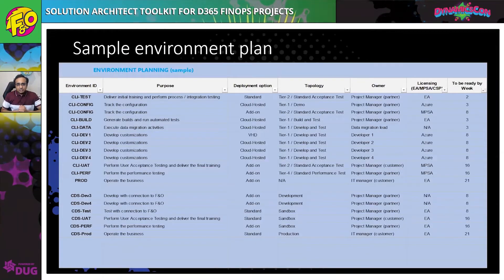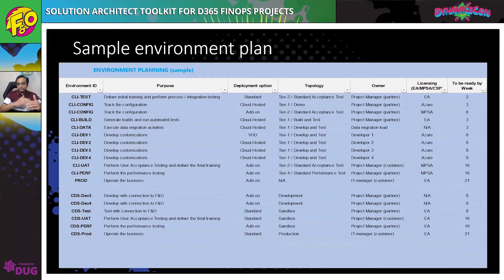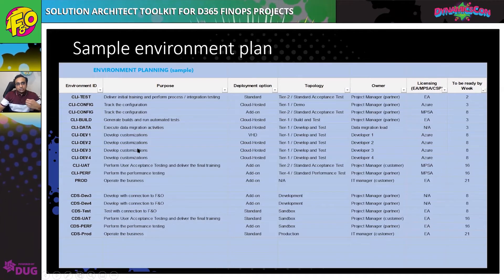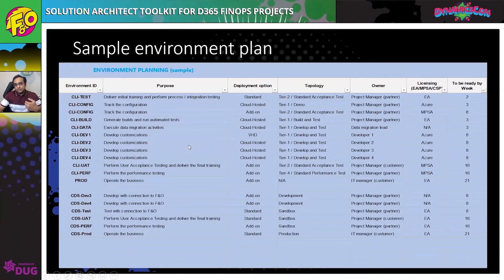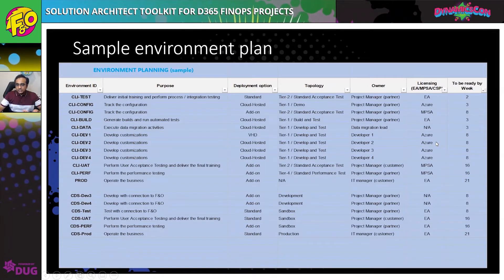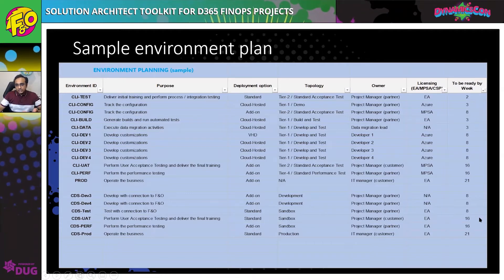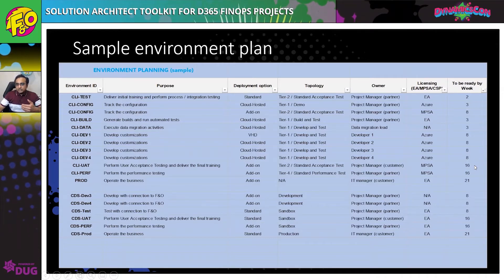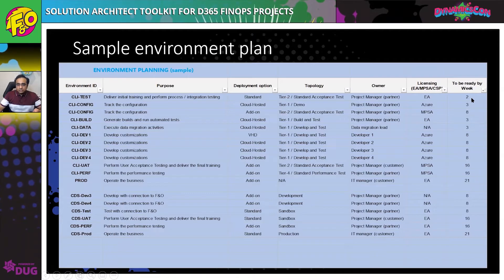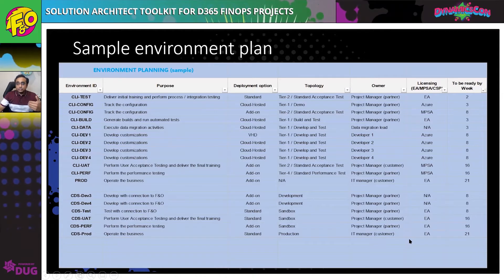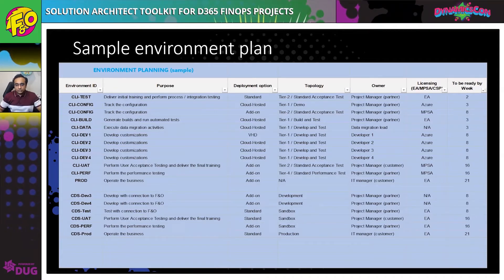What I'm presenting is a sample environment plan which you should prepare from the beginning of the project as a living document. It should capture the environment naming convention, the purpose of each environment, where it will be deployed, the topology, who manages it, how licensing will be maintained, and when the environment will be ready. This is important because if you need an environment by week 16, it's not wise to start paying for it during the early phases — plan your environments so you know when you need them and host them accordingly.